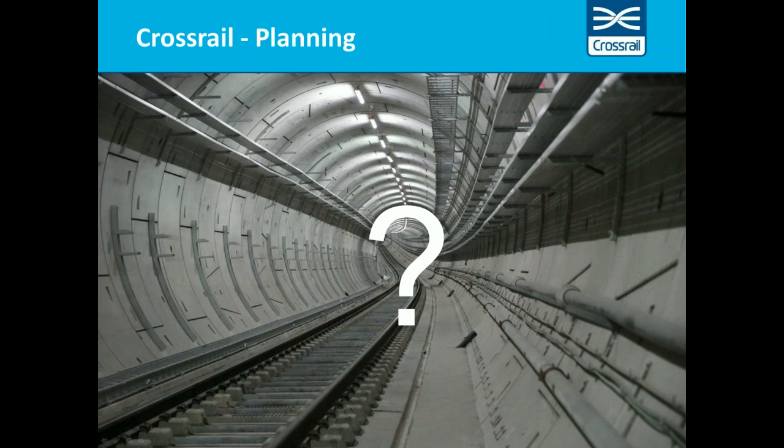CMS, so cable management systems, that you can see in the photograph there, if it's still on your screens, are easier to measure. We have drilling machines which are working their way through. We know how many meters the drilling machines have done and how many holes would be in that section. So it really depends on what it is. Some things are really pretty straightforward, but other things are more difficult.